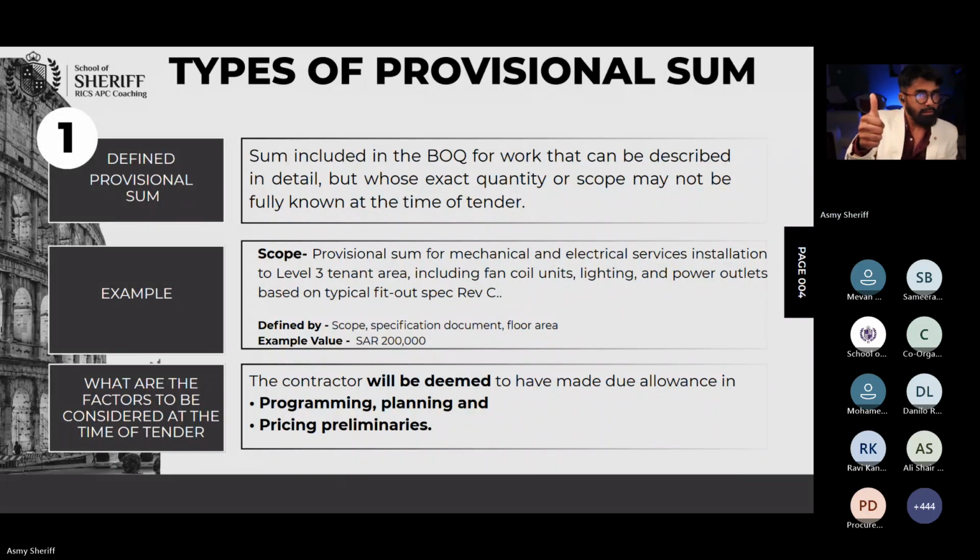1, program. If I'm an experienced contractor, I need to construct a 2-story mock-up room of 3,000 square meter. From my previous experience, I can plan how long that's going to take. At the time of developing my program, before I submit it to the client, I'm going to estimate how long this may take, and when I should start and when I should complete.